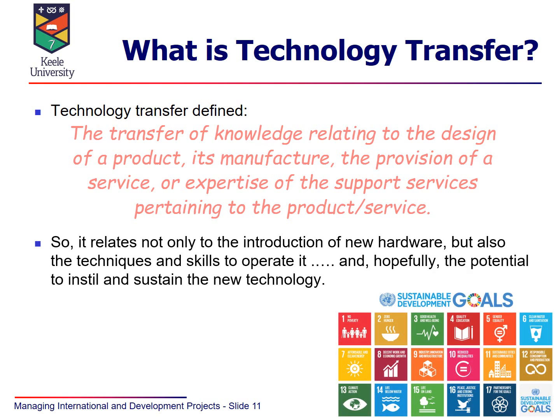What I want to get across is that it's not just the introduction of new hardware, but also the techniques and skills to operate it, and hopefully the potential to instill and sustain the new technology. Sustainability is a very key aspect in international project work. It's no good transferring knowledge and a technology if it is then not operationalized and not sustained going forward into the future. If you haven't instilled the skills and competencies to continue operating that new technology, then the project will be a failure.